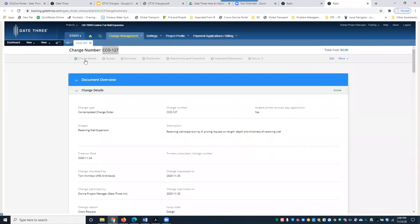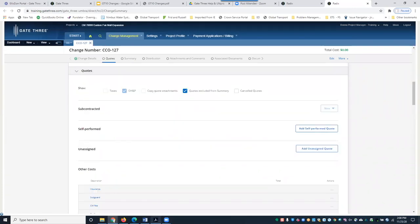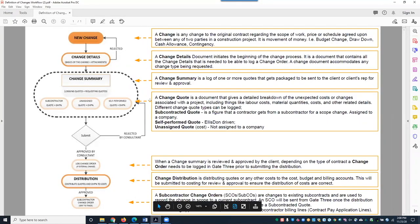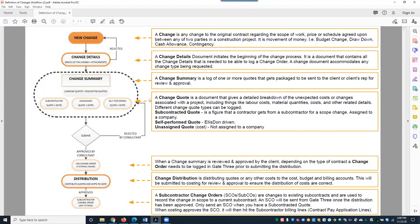We've completed the change details. The next section of the change process is gathering quotes. A change quote gives a detailed breakdown of costs associated with the change, including labor costs, material quantities, and other related details. There are different quote types: subcontracted quotes, which come from a subcontractor for a scope change and are assigned to a company; self-performed quotes, which are Ellis Dawn driven; and unassigned quotes, where there's a cost but no company assigned to it.